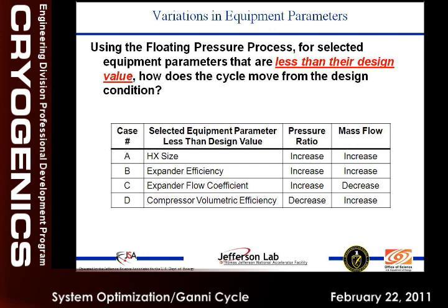That's what we did. And what happens in real life is every component has tolerance. Although we specify at one point, for either heat exchanger, we say 98% effective, it can be 99 or it can be 95. Once the machine comes here, it comes 2 years late, and then we are behind schedule. We want to take what we get, and it never goes back. And all of us, including me, when I was at the end of that, we know that. All we have to do is take it there. Once it is there, it's not coming back. We mess around for a while. They will be happy with living with it. And so we learn that's the way that traditionally it works.